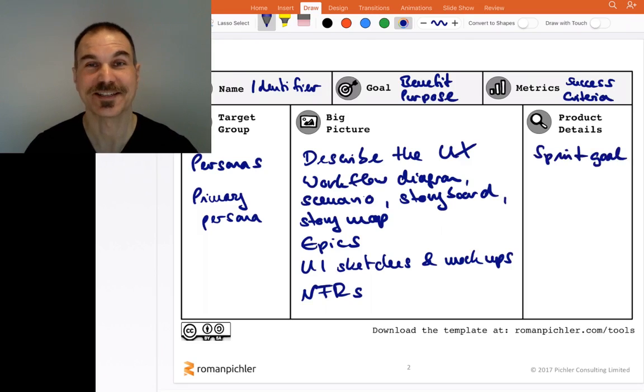So for instance, if we're building a product and feel that it would be good for users to register first before they use the main product functionality, so they can capture some of their preferences or some of the relevant personal details, then there may be a risk that this actually is a barrier to adoption and may prevent people from using the product. And so it'd be worthwhile testing it out. And that could be the goal of an early sprint, maybe the first sprint. And if that's our goal, then we have to derive the appropriate items or capture the appropriate items.